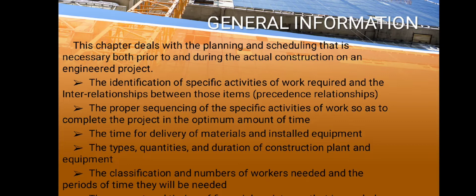Ideally, a contractor should complete some of the planning prior to the bidding of the project, since planning will frequently reveal a number of factors which significantly affect the cost of the project. Of course, such planning in itself is costly and often very time-consuming, but the potential benefits of such planning are enormous and every effort should be made to do as much pre-planning before bidding as is practicable.